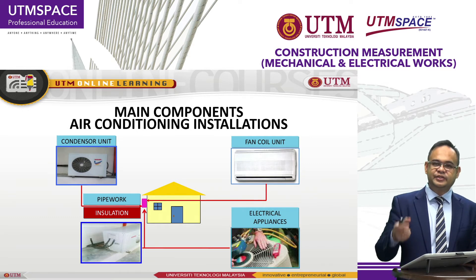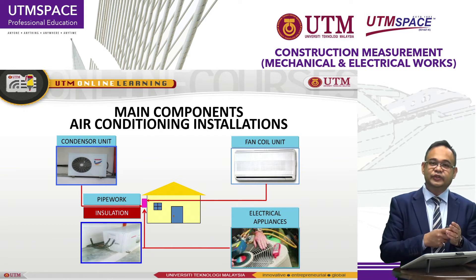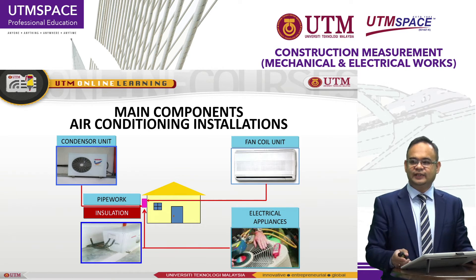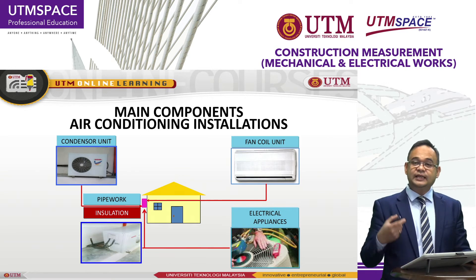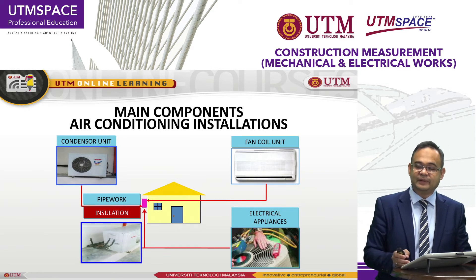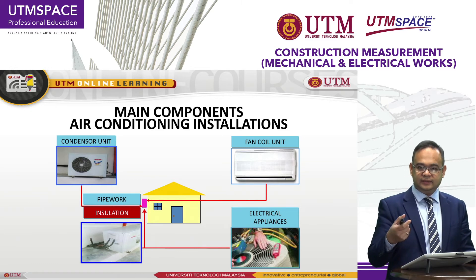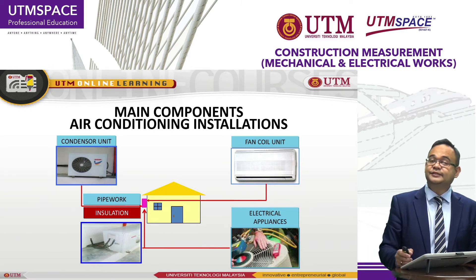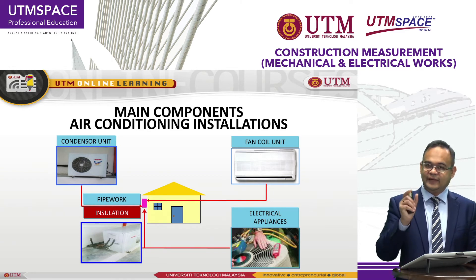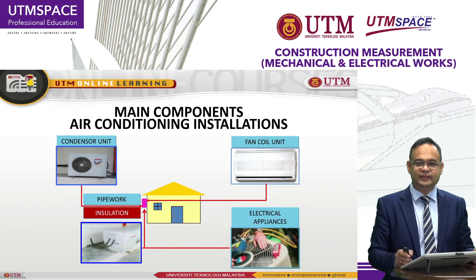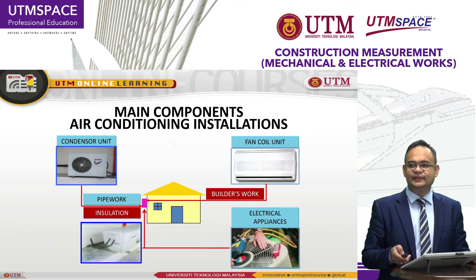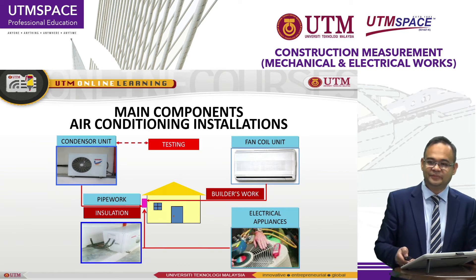This basic infographic shows the components for measuring air conditioning installation. First, you need the equipment — for example, a condenser unit and a fan coil unit. These are connected using pipework, and all supply pipes need insulation. Then there is the electrical system, builders' work and connections, and finally testing and commissioning — about seven main items for air conditioning installation.